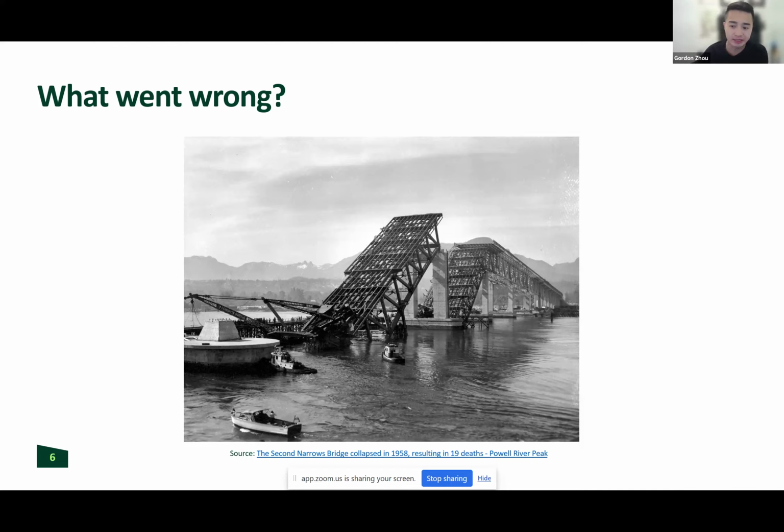And then lastly, the third key lesson here was warning signs from emergent risks. So while the bridge was under construction, there were movements, deflections, and deformations that weren't supposed to happen. And while that was happening, and there were early indications of instability, no one really thought that could turn into this disaster. And so active monitoring of risks and then having a response plan to act quickly could have avoided this disaster.